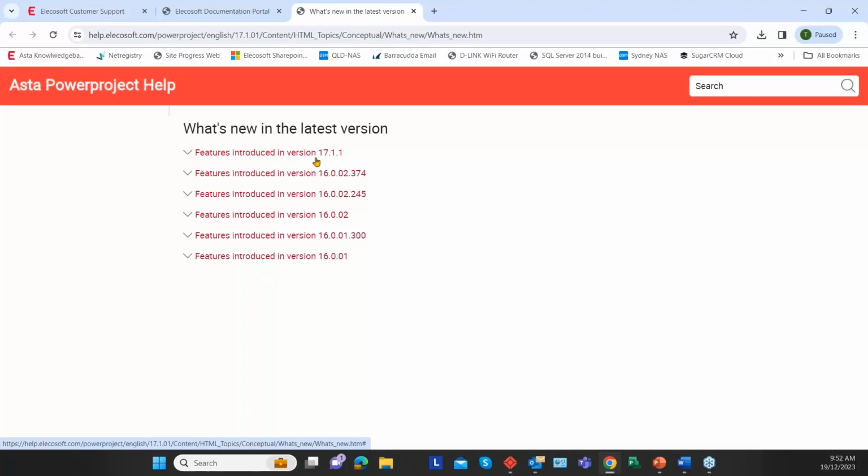If you have 5 or 10 print profiles, you can tell a user not to edit a couple of them, or that they can edit or delete most of them. There is also a new quality check, where you can now calculate the percentage of activities which don't have an outgoing link from their end. There are a few enhancements to that, but you can see more detail from the link here.